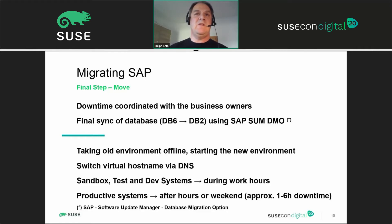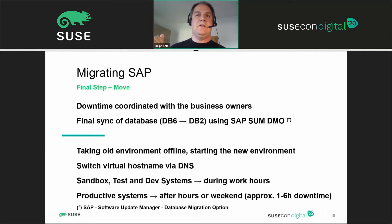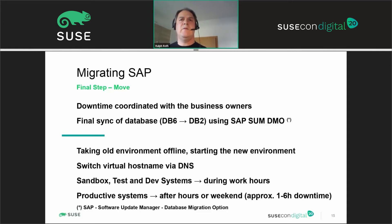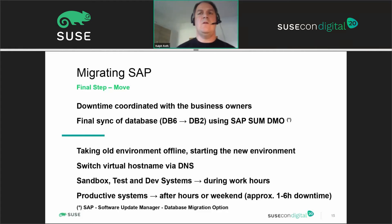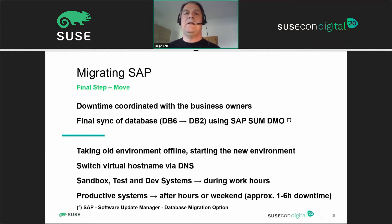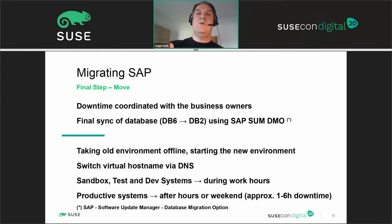At the scheduled downtime, we performed a very short final sync, took the old environment offline, and started the new environment. We then simply switched the virtual host names via DNS. The whole migration took the time for the final sync plus switching and propagating the virtual host name via DNS — normally between 15 and 30 minutes. After that 15 to 30 minutes, you could already start with testing and user testing.